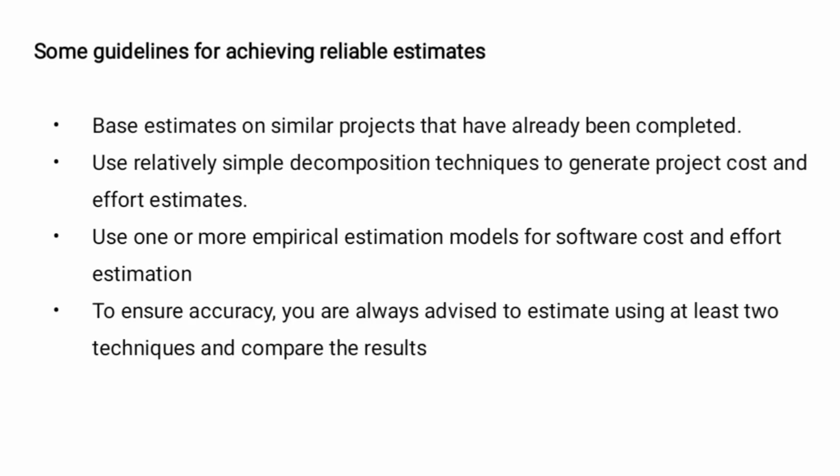Some guidelines for achieving reliable estimates. Base estimates on similar projects that have already been completed. Use relatively simple decomposition techniques to generate project cost and effort estimates. Use one or more empirical estimation models for software cost and effort estimation. To ensure accuracy, you are always advised to generate estimates using at least 2 techniques and compare the results.